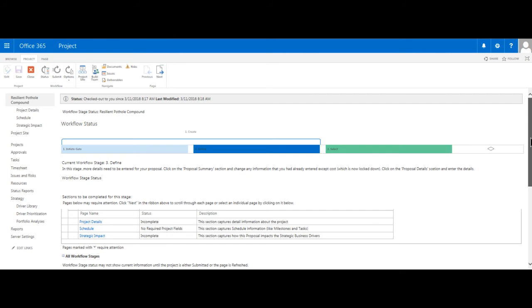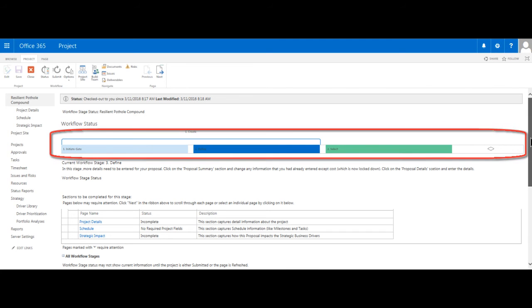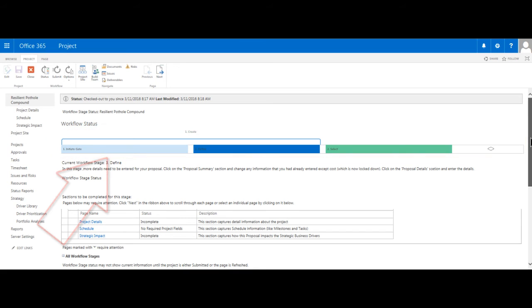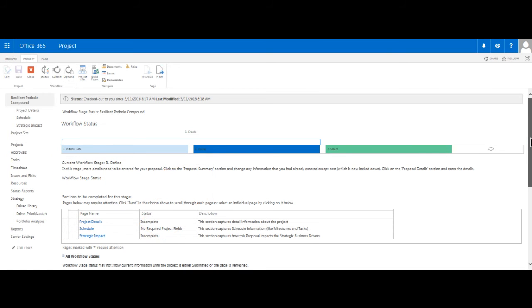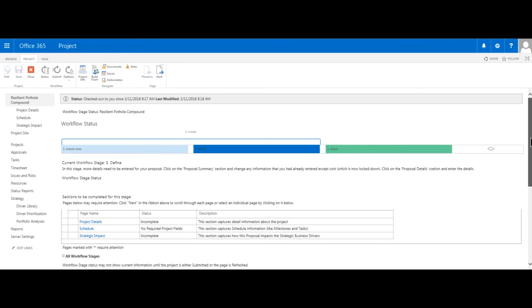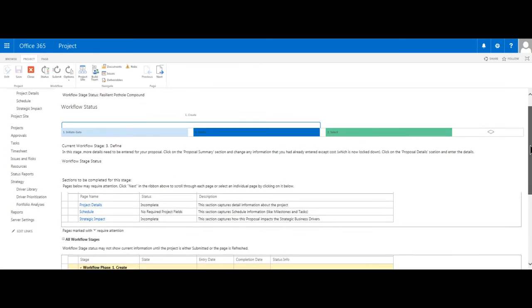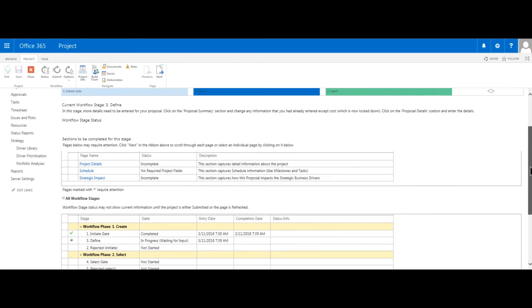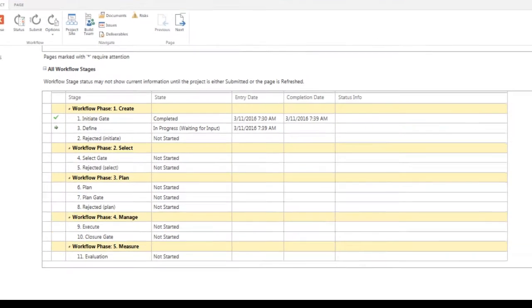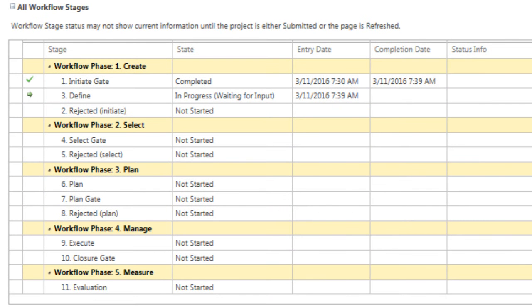I will return now to our Project Workflow status page, where we can see that the graphical representation of the workflow has been updated to reflect that we have successfully moved from the Initiate gate to the Define stage. We can also see the Select phase is next, but before we can proceed to that phase, we must at the very least complete the Project Details and Strategic Impact PDPs. If we scroll down this page, we will notice that at the bottom, there is a section titled All Workflow Stages. We can expand this section, which reveals all the phases and respective stages in the workflow for the new product development project type that we chose when initiating it.